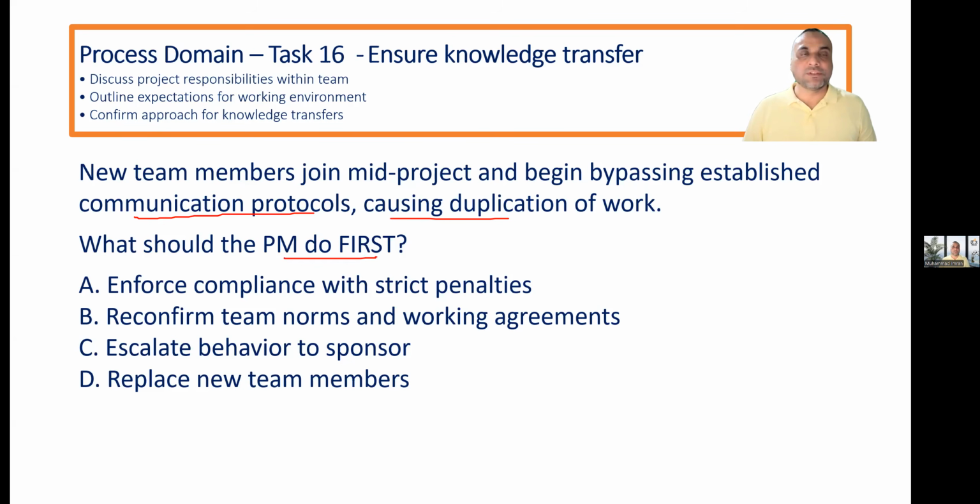Options: enforce compliance with strict penalties, reconfirm team norms and working agreements, escalate behavior to sponsor, replace new team members. This will be our first choice, and then if they are repeating the behavior, you can go for the second. But first, you will go with the ground rules and team charter. Very good.